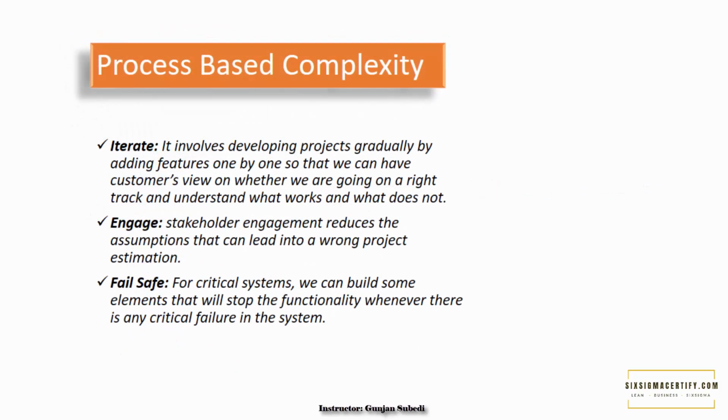Process-based complexity. The complexity can be reduced by iteration, which involves developing projects gradually by adding features one by one so that we can get the customers' view on whether we are going on the right track and understand what works and what does not. So iteration is a process-based complexity reduction technique which we use in Agile projects.